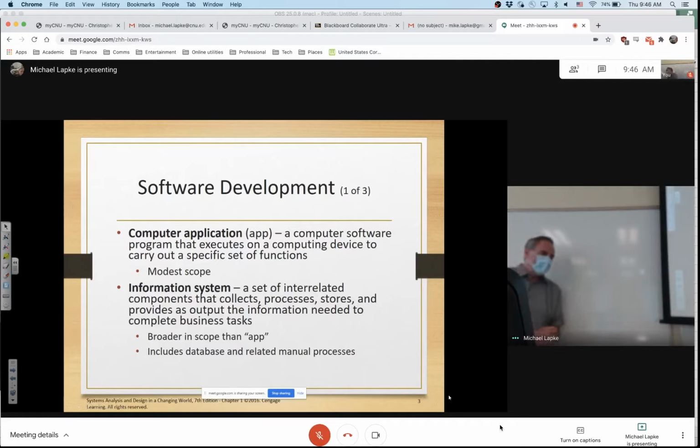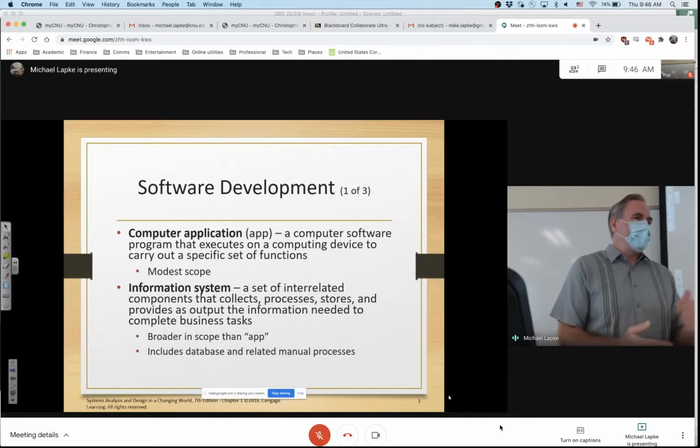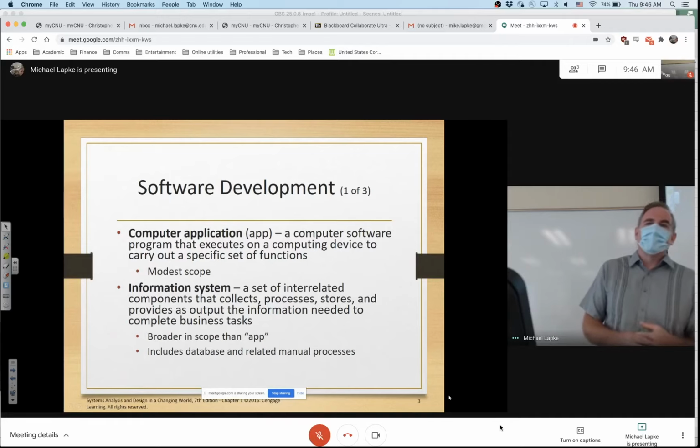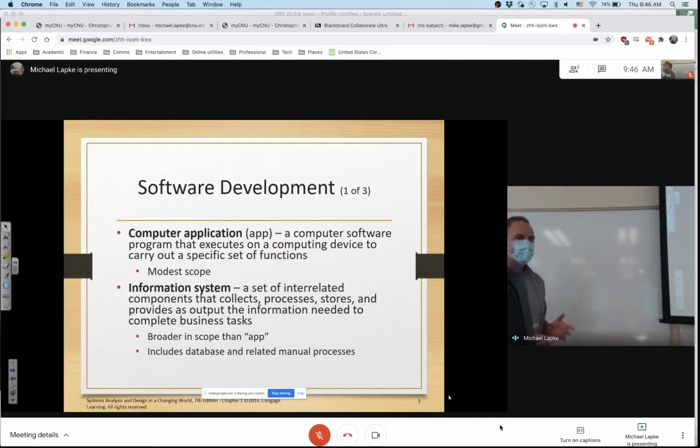What about this? What if I had 90% functionality, but it took me 3 years to do it instead of the 1 year that I'd allocated? Is that a failure? In a way, it is also a failure. So be careful when you say failure rates, because it can mean a lot of things. So including all of those, it's at 65%. 65% of all new IS projects fail in one degree or another. Total abject failure is around 20%.